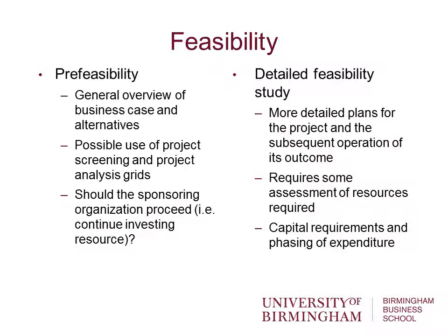should it continue to invest resource? And the reason for that is that as the project progresses through the design and planning stages, the detailing stages, then the organisation is spending money, spending resource in terms of carrying out those early planning project activities. And as time goes by, more and more resource will be spent on the project. If they're not sure about the project going ahead, then that could be a whole load of wasted money or wasted resource on designing and detailing the project.